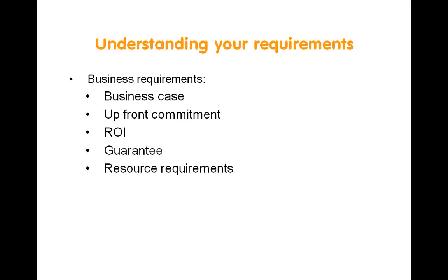Most organizations are looking for an ROI within about the first 2 years, and that's generally realistic if you follow the best practice guidelines that your service provider will share with you. Also, in terms of a guarantee, a lot of service providers offer a guarantee these days if you follow their best practice guidelines. Just look into what the detail of that guarantee actually is. And if I were running a project, I'd want to have the guarantee in place.